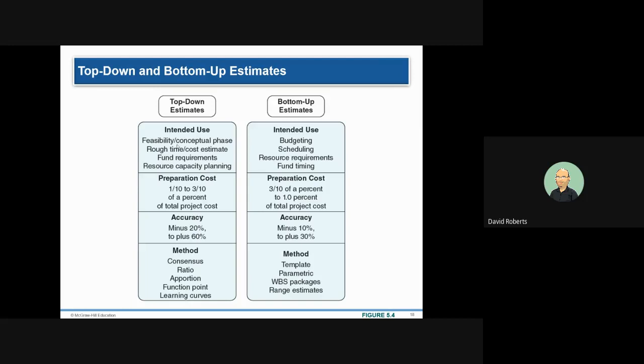And in the bottom-up approach, you sit down and ask, how many days are we going? How much does the hotel cost? How much is food going to cost us? How much are the excursions going to cost us? Very cheap if you just want to go there and sit on a beach, but if you want to do other things, like going on tours or going to some specialized places, it can get very expensive. So these are different estimates, but this tends to be a bit more accurate because you put in more effort when you do your budgeting for your project.